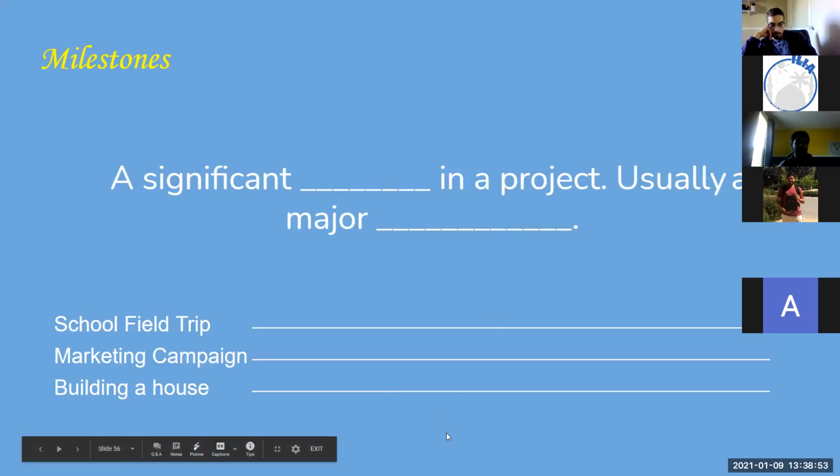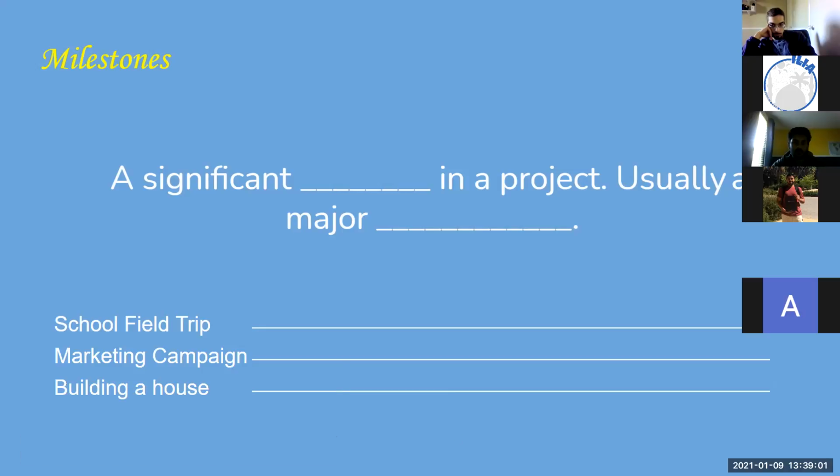We don't need to do these other two, but milestones and members, they're major accomplishments, and they're usually tied with a payment. You get a reward as a project manager. So in the examples you gave, the 50 students registration, that's a good milestone because at that point, your client can pay you for the work that you've done up to that point. Or getting your bus contract signed, you can now be deserving to get paid because you accomplished a major milestone at that point.